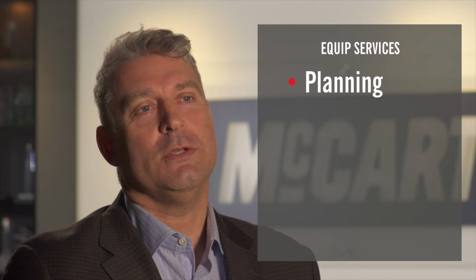So if you start understanding the burn rate of a project with all of the costs that is accumulated during a month delay, plus the disruption of medical equipment, those dollars can be used a lot more efficiently. We started our journey into turnkey medical equipment, and what that is, McCarthy now takes on full responsibility for the validation, design, coordination, procurement, construction, and handover of everything to do with medical equipment.